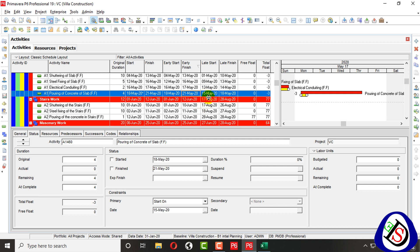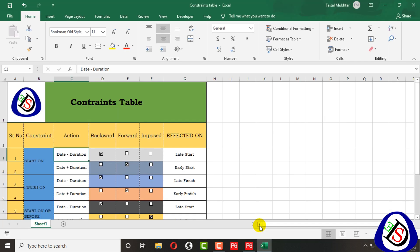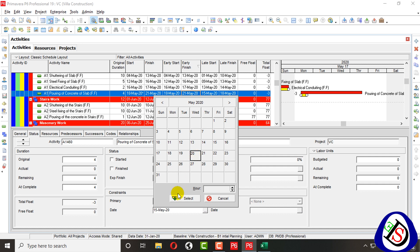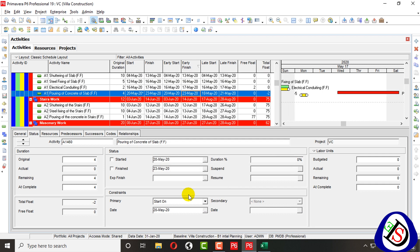When I minus the duration, only Late Start is affected. When I plus the duration forward, Early Start is affected and moves forward — it's logical. So if I assign 20 May using Start On, my Early Start will be affected. You can see Early Start moves from 18 to 20 May, while Late Start remains at 18, and the original date follows as 20 because Early Start moved forward two days.